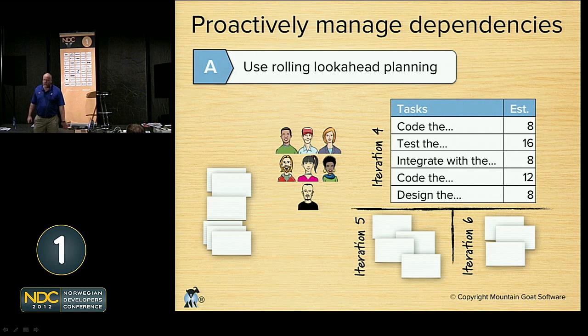You say, no, we're busy. And I say, I don't need it now. And can you do it next sprint? Oh, sure, we can do it for you next sprint. So you do it for me in the next sprint, which would be sprint 5 up here. And now my team has it by the time we start sprint 6. So we're always looking ahead 2 sprints here.